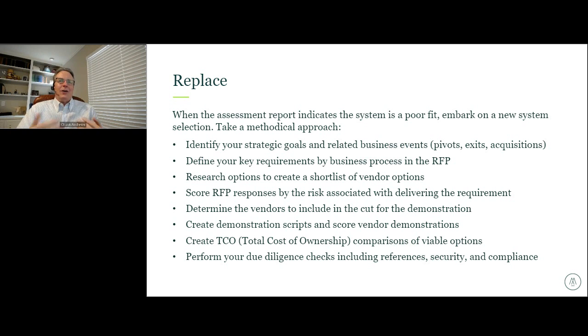Once we get RFP responses back from a vendor and we've determined a short list of vendors that are going to make the cut, we conduct a scripted demo. So in other words, we provide scripts for the vendor on here's what we need to see. Take us through this process. And we also score the vendor demonstrations, and we involve the client in that process. Once we arrive at viable solutions that fall out of that decision support, we look at the total cost of ownership and compare those viable options.